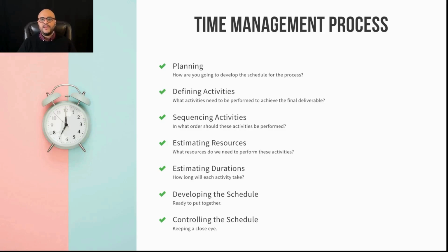Next, we need to define activities. Think back to the work breakdown structure. Use that to your advantage. Your work breakdown structure has your activities listed, has your work packages listed. These are the activities that you need to perform to achieve the final deliverable.